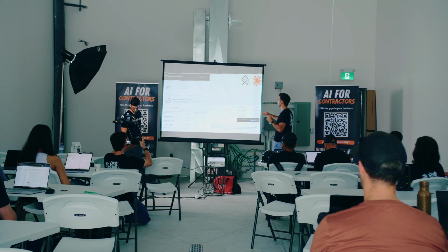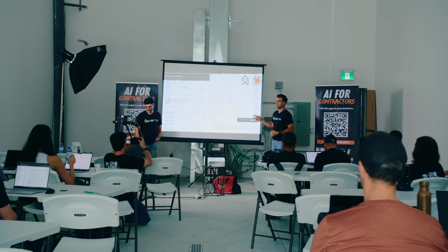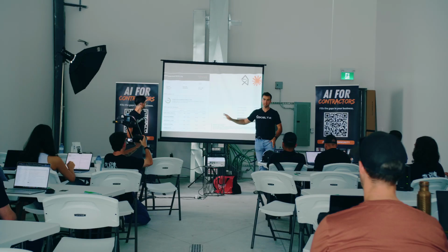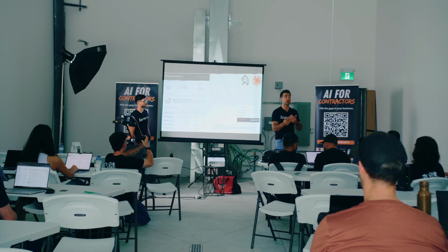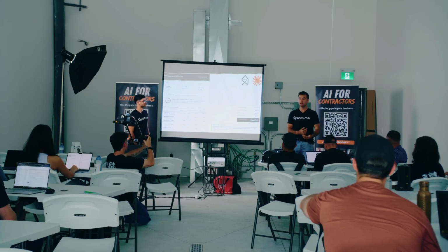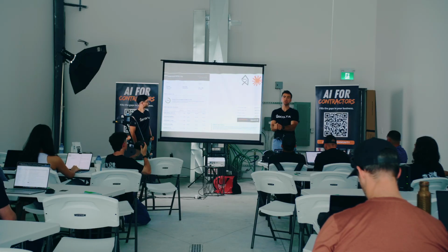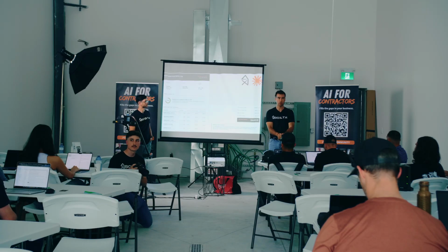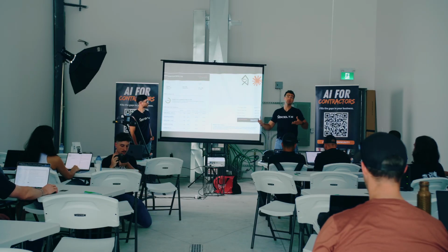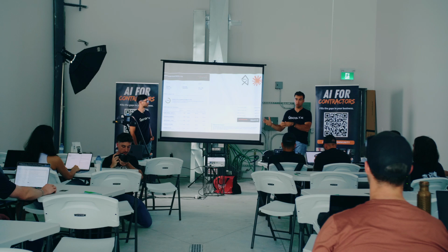And then lastly, it'll take your entire contract value, and it'll say earned to date, you've earned 71% of your contract. And if you send something like this to a GC, or even if you're working directly with a consumer, sending it to a client, they far more appreciate knowing what's been completed and feel better about what they're paying for, because they know the work's been completed, right? They don't have to meet you on site to make sure everything's actually done properly. Make sure you timestamp the photos, make sure you show your work, and more often than not, you'll probably have a better chance of getting paid for that work.